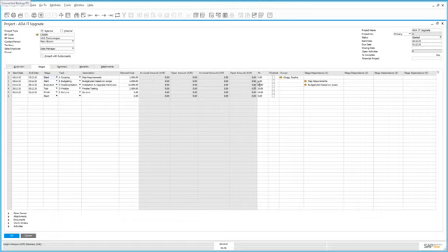We've also defined the percentage in which this particular stage will take across the entire project. For example, this stage is only about 5% of the entire project. This is where we define whether or not the stage is completed. We also have the ability to assign an owner or a person responsible to this particular stage or task, and in this case Sophie Clogg is responsible for this planning stage, and our overall project leader is Jason Butler, who is our sales manager.